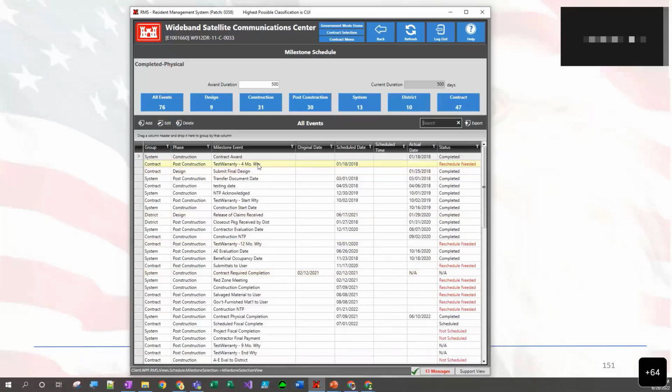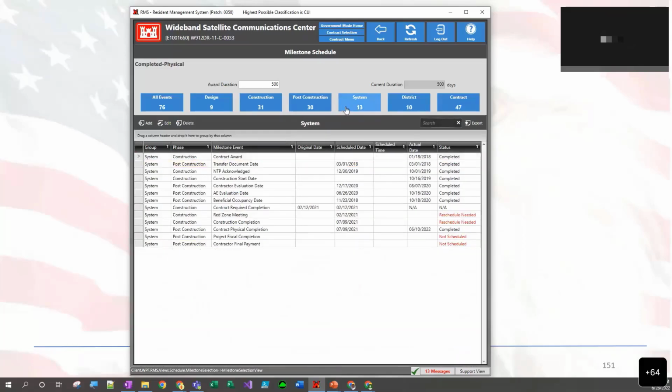So I can help answer that question. If you assign the project to phases, then you could set up a separate P2 project for each phase. So that might be one way that you could accomplish what you're asking, because you can also have a separate set of milestones for every phase.